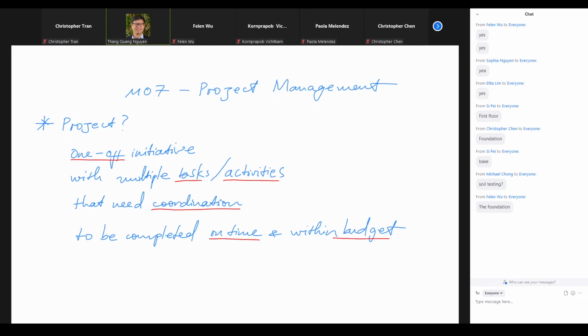right? Otherwise, if we put the drywall up quite early on, then later on you have to rip it out to do electricity, to do water, things like that, right? It's not good at all. It costs money. It takes more time. It takes more effort. Right? So that's why in project management, one of the key things is we have to sequence the activities correctly, right? To save time, money, and effort. Not to mention that it is the correct, technical way to do it, things like that, right?